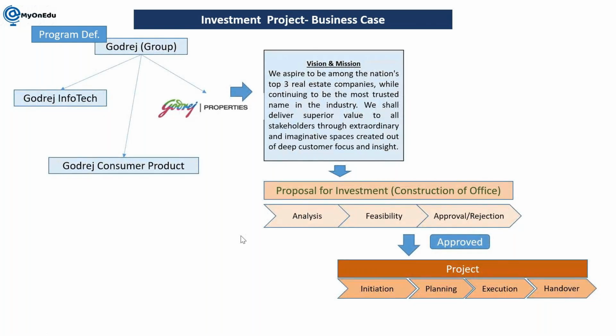Whenever any proposal is going to be submitted, first we need to do the pre-investment analysis. If it is calculated that it will be beneficial for us, then only we are going to execute this project, otherwise we will drop it. So this scenario comes under the investment project scenarios.